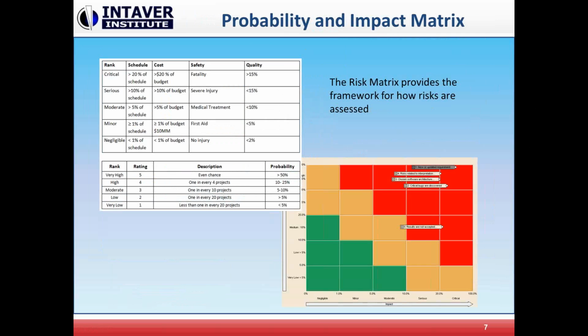And a lot of times when you set this up, it really goes to show how the risks are scored. So the score will be the same, but you may want something to land in the red as part of risk reporting, so that everything in the red, we're going to have a risk plan for. We call that maybe critical or serious. Sometimes you may need to modify the out-of-the-box 5x5. Perhaps you only have a 3x3 risk matrix, or we see many different combinations, 4x5, etc. So we can modify that to meet any specific requirements of your risk management system.